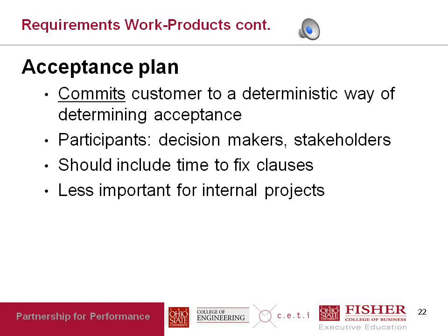Okay. Now, a couple of things with respect to the acceptance plan. The acceptance plan is done jointly. It's not done just by the development team. This is because when customers are actually asked about how they will test the system, they will be more precise in giving the requirements in the first place. And secondly, this is meant to be a collaborative effort. It's not meant to be an adversarial effort. And then typically in these acceptance plans, there is a time to fix clause.